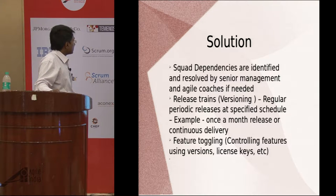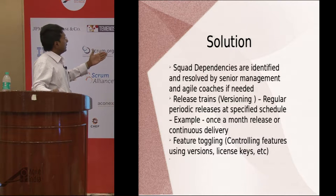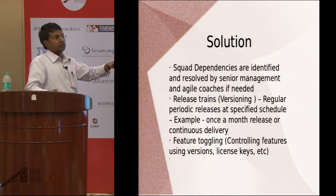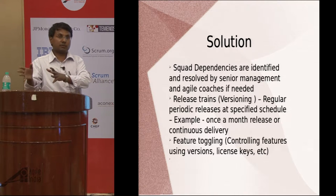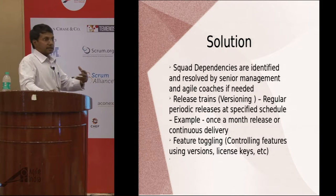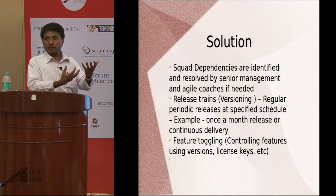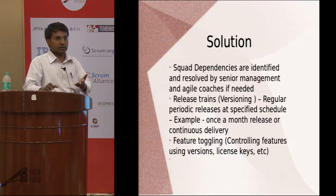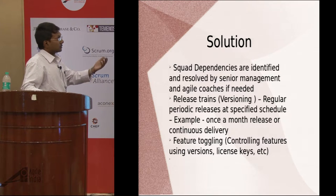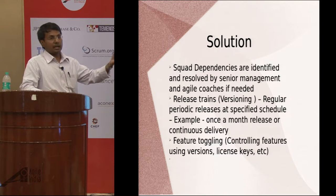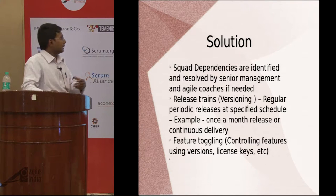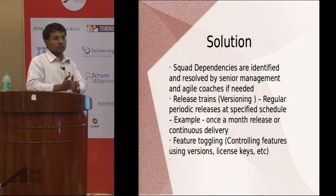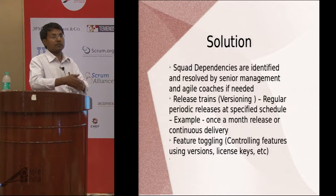Squad dependencies are identified and resolved by senior management and agile coaches if needed. Senior management makes everything transparent so the work of all squads is visible to every other squad. If there is a dependency between squads, it is identified and the responsible squad takes that as higher priority. The squads' work is controlled by both business objectives and the squad's own technical objectives — it should not be that the squad works on features nobody wants, while still being responsible for delivering business requirements.